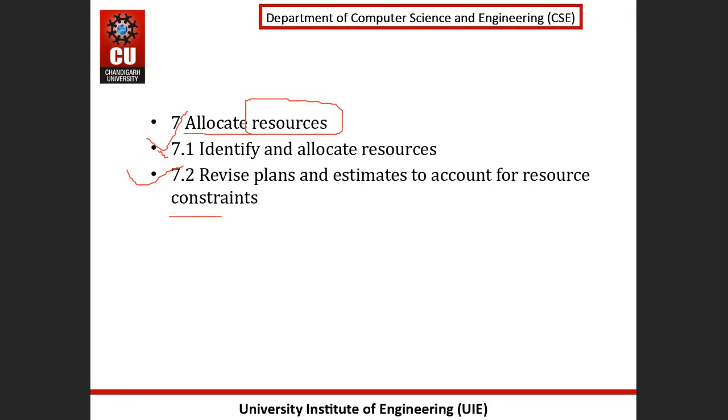So ensuring someone is able to start work on an activity as soon as the preceding activities have been completed might mean that they are idle while waiting for the job to be started and therefore used inefficiently. So according to this kind of situation, we should revise, we should modify our plans.